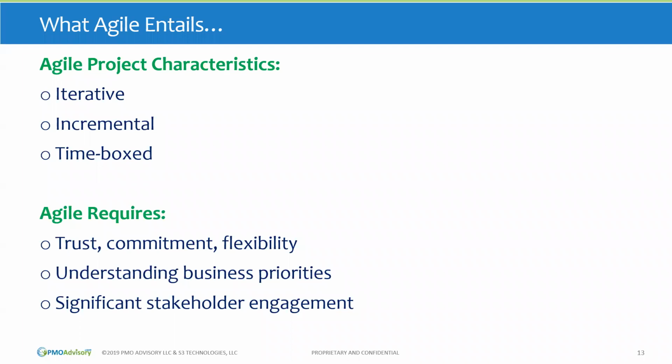And the reason for that is because we're very plan-driven in traditional project management, and we're delivering on a committed scope. In Agile, we're value-driven, and our schedule is put in place, so we have a time frame, and that's our time box for that iteration. We get to the end of the iteration, if we haven't finished something, we stop anyway. We take the thing we haven't done and we reprioritize that. That's really valuable because we may find, even though we're focused on finishing something that we've been working on, there may now be other things that are more important than even finishing that thing that, even if we're 95% done with. Okay,